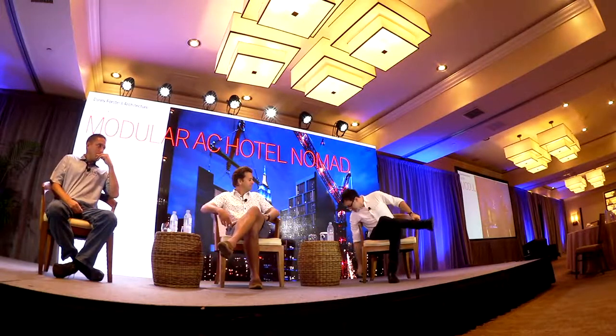I would also add to that, on the wood frame, 5-story podium, 4-story woods, you're going to ultimately flatline with the speed you can do because you're stacking horizontally and it'll go as fast as it can go, and that's great. For the urban infill high-rise volumetric steel, there's still a lot that we can do. In this case, we're casting our core traditionally out of concrete. We investigated the precast situation. On a project like this, I would say hit a solid double, right?